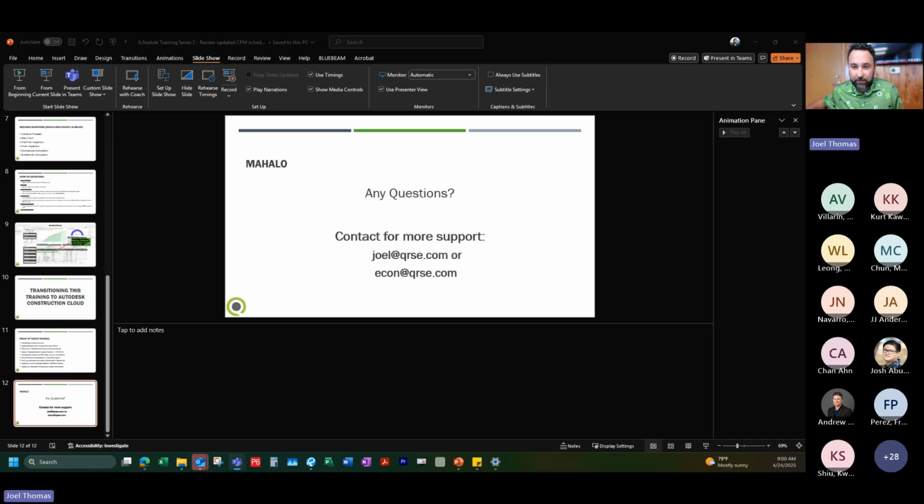Oh, there is a question. What if you have a new contractor that's not familiar with the contract? The question is asking if they're not familiar with XER or MPP. So Marvin, it is actually required in the standard special provisions that they use either P6 or Microsoft Project to generate their schedule.